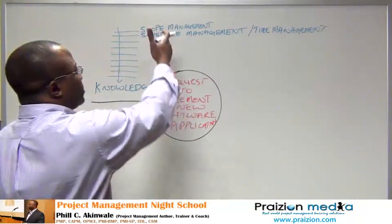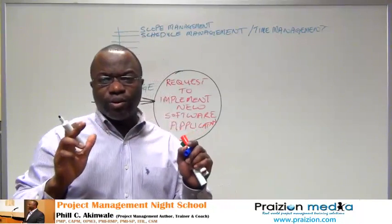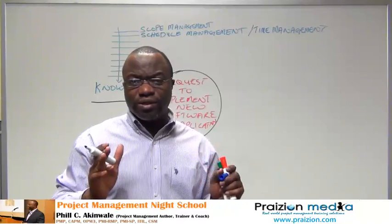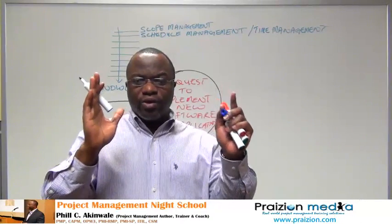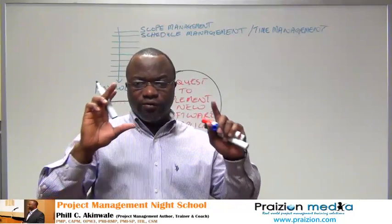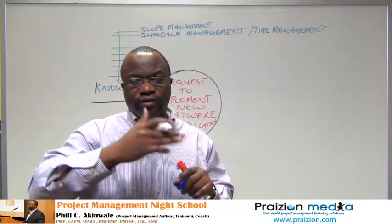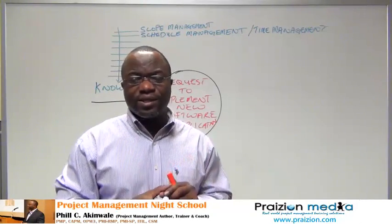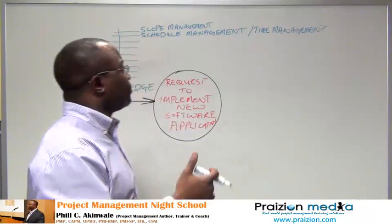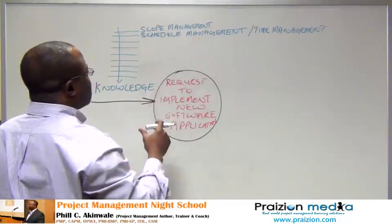Now, by the time you begin to do these things, you begin to deliberately define the scope, using certain documents, using certain approaches to make the scope frozen. You want to freeze the scope, you want to make sure that there are no unauthorized additions after a certain point. You want to stop any additions without thorough analysis and without thorough approval. We're talking about scope management. Here, we're talking about schedule management.